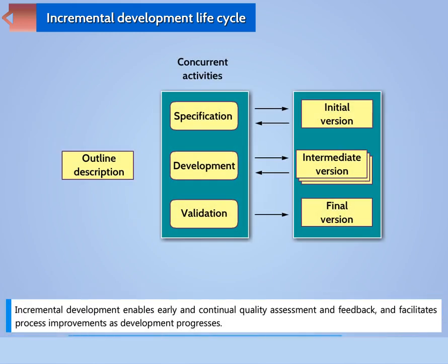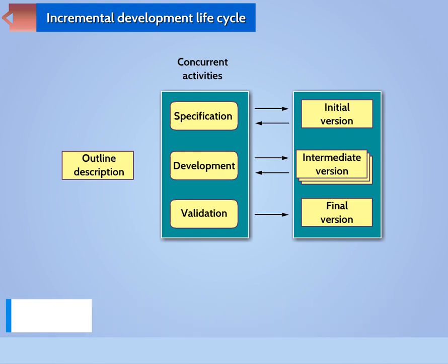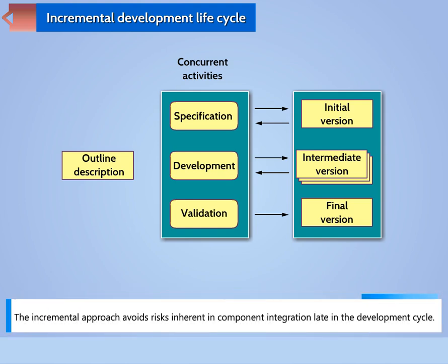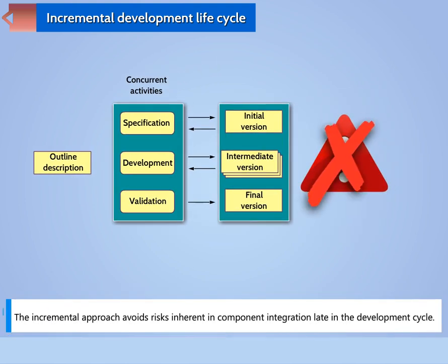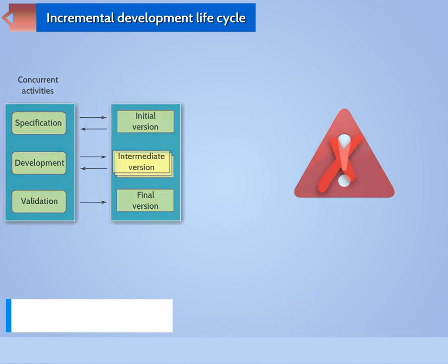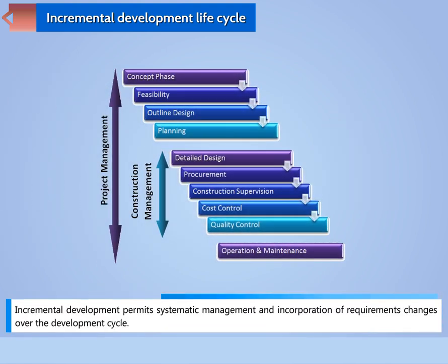Incremental development enables early and continual quality assessment and feedback and facilitates process improvements as development progresses. The incremental approach avoids risks inherent in component integration late in the development cycle. Incremental development permits systematic management and incorporation of requirements changes over the development cycle.